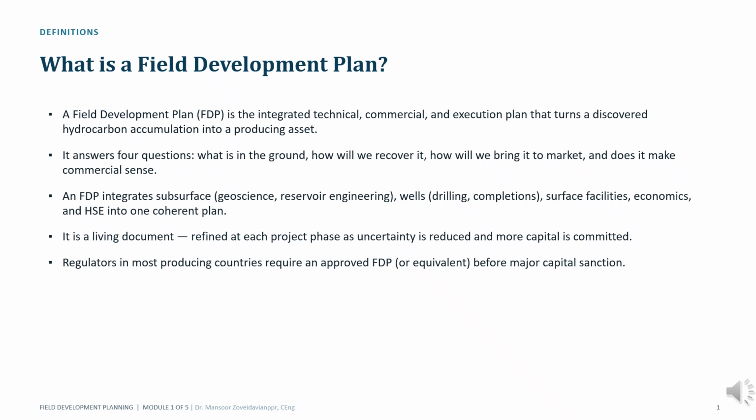I often ask teams where FDPs typically fail. The answer is rarely because one discipline made a catastrophic mistake. More often, the failure occurs at the interfaces between disciplines, where assumptions don't align. That's why integration is the defining characteristic of an FDP.